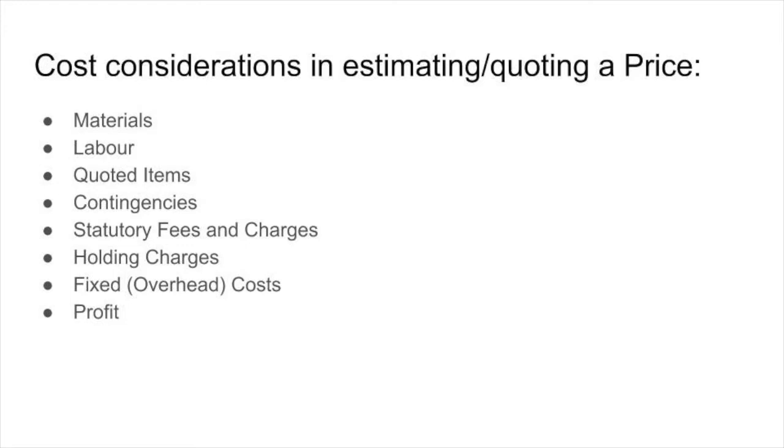There are contingencies too. Contingencies are the unknowns. Almost all people who estimate put in a contingency of approximately 10%.